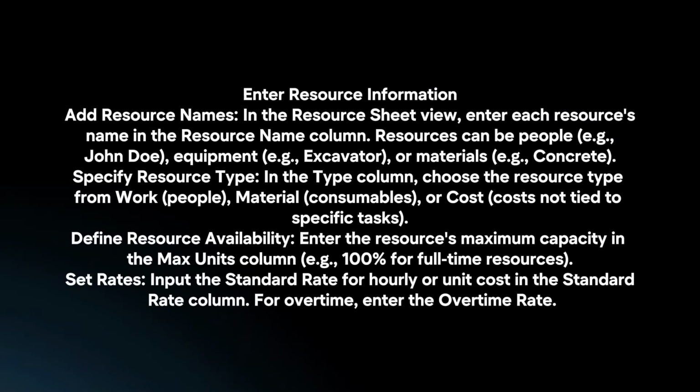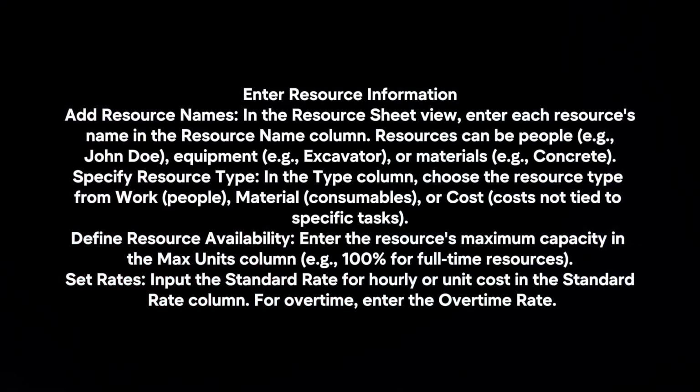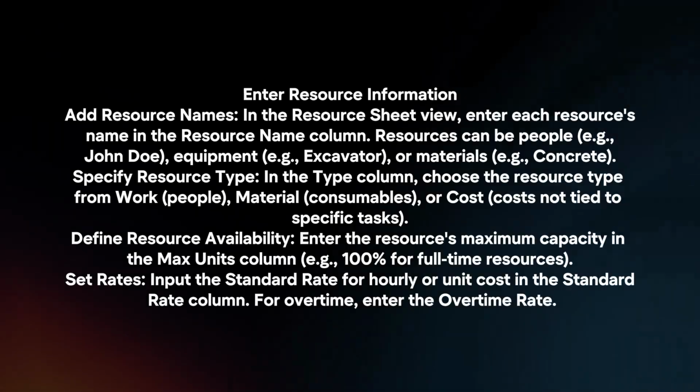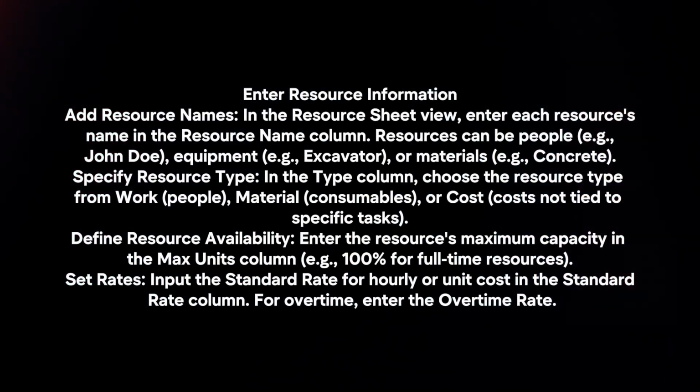Define resource availability. Enter the resource's maximum capacity in the Max Units column. Set rates. Input the standard rate for hourly or unit cost in the Standard Rate column. For overtime, enter the overtime rate.